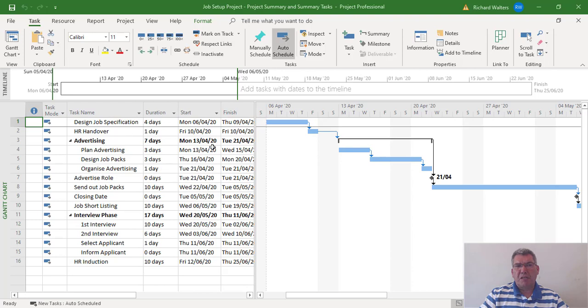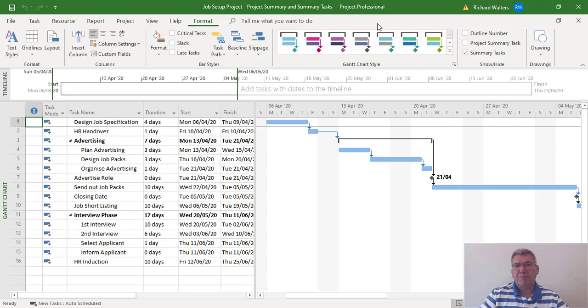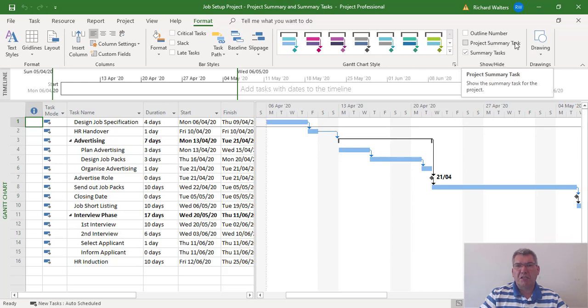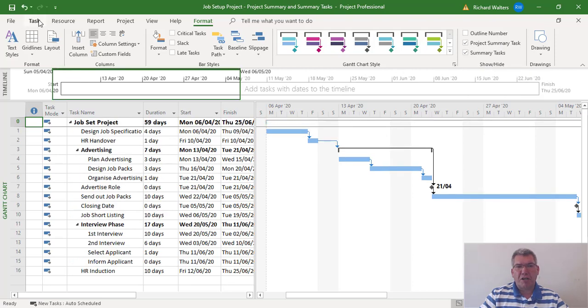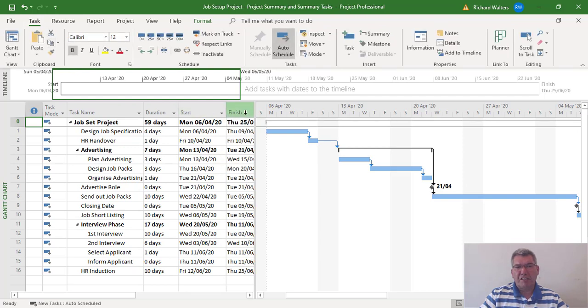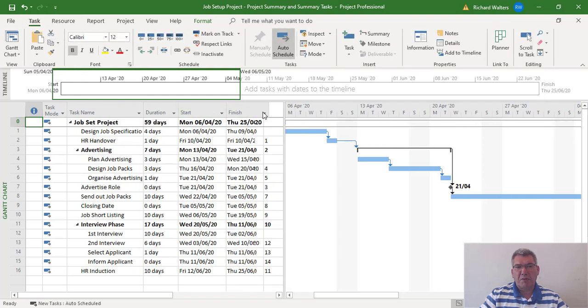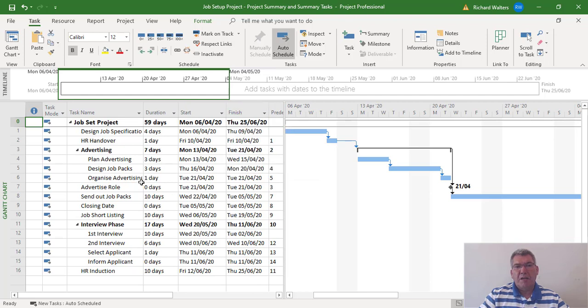First we're going to look at the project summary task. This is on the Format tab, under the show/hide section of the ribbon, and then you can display the project summary task. This shows the duration of the project as well as the start date and finish date, as displayed in this example.